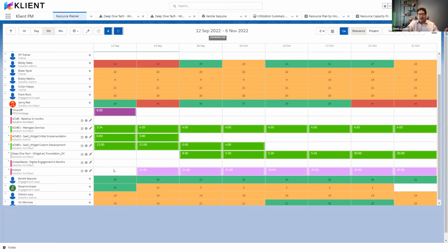So I could either decide to change the hours assigned to this resource because it does not fit, or I could change another resource assignment because I absolutely want GennyRed to be part of this pipeline project, and I want these hours to be on her. Or maybe just postpone these hours for GennyRed a bit later based on the information I have on that resource planner.